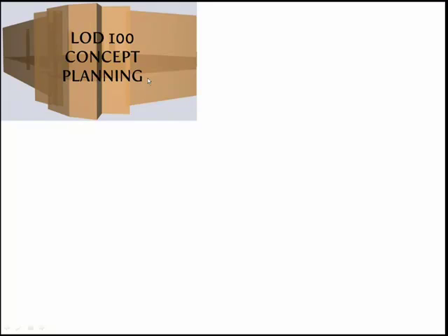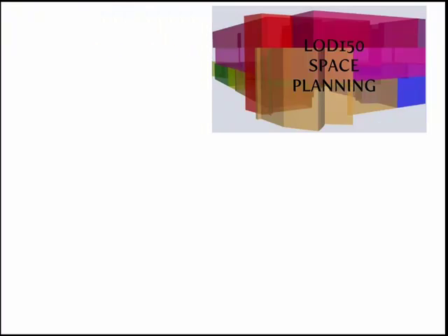So instead of saying, at schematic design, we're going to give you an SD concept, we're going to be able to say, you know what, for instance, on some of these foundation elements, level of detail 100, we're pretty good. We'll be able to give you a number that you can take to the bank. However, when it gets to finishes, you know what, level of detail 100 isn't really going to cut it. So we're going to need more detail on that as we evolve the project.